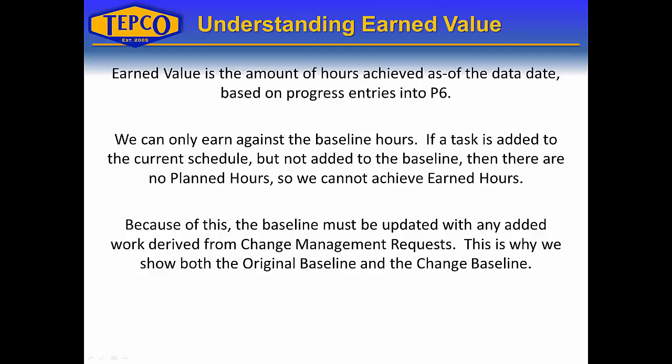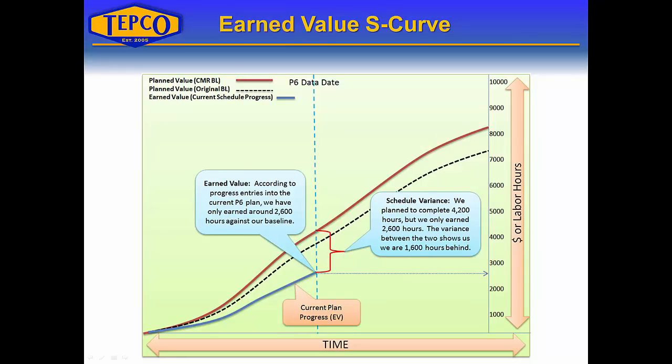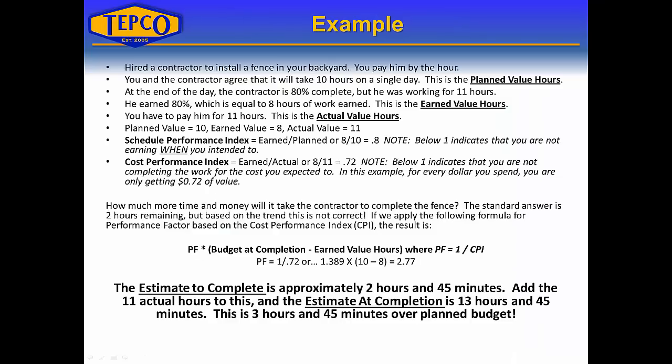Here's the same S-curve example with the earned value line added. You can see there's schedule variance between the planned value from the CMR baseline and the earned value to date. The graph indicates that the schedule is not earning hours at the rate that was planned.